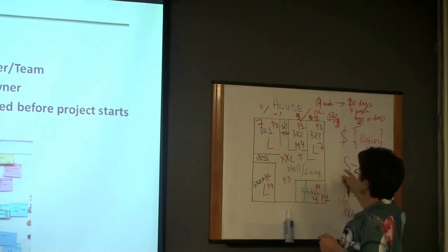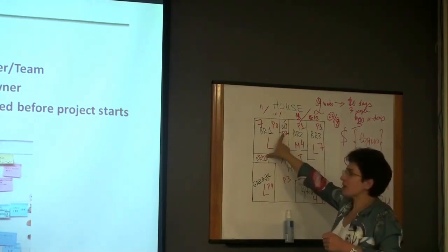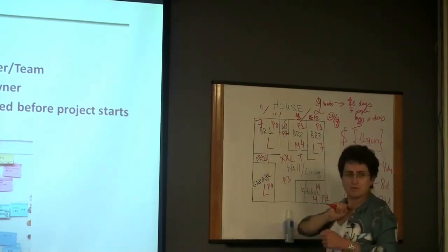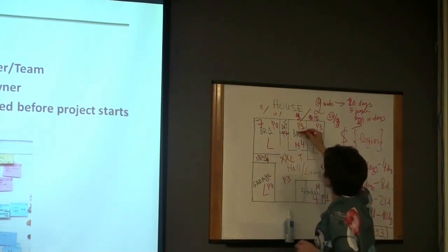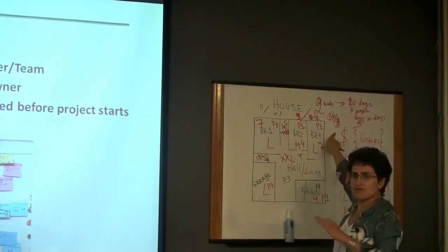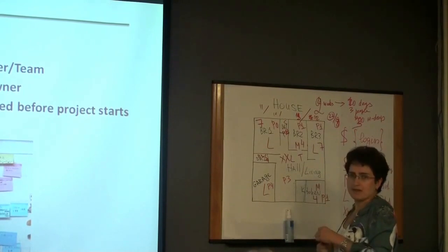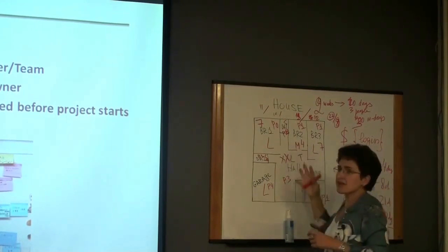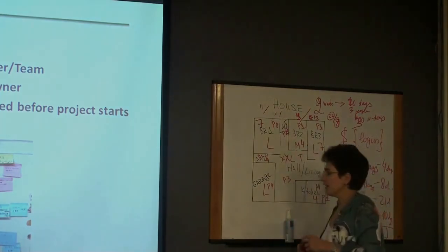In 8 days we can do 2 bathrooms, and we'll complete almost everything except for P3 and P4. Isn't it beautiful? Yes, it is. So we are taking those 2 bathrooms, and our sprint planning is done. We filled this with all the resources. We cannot take more than that. And this is how planning is done using this methodology, approximation, right?